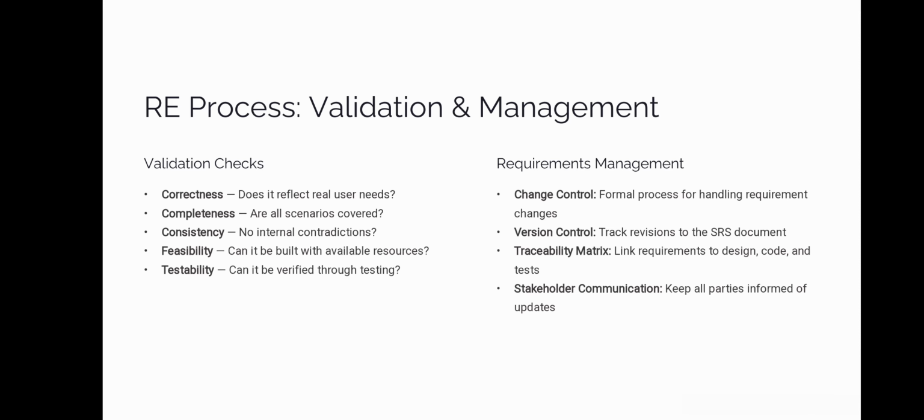Validation is our quality check. Is the requirement clear, complete, and testable? After validation, we move to management. Requirements aren't static, they change. We use a traceability matrix to link requirements to code and tests, ensuring that every change is tracked and justified.